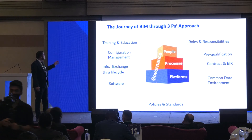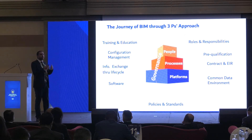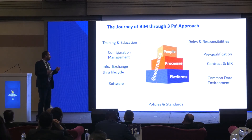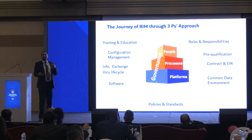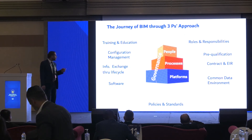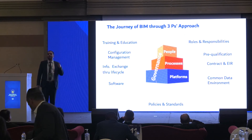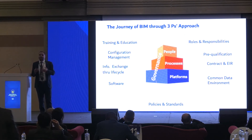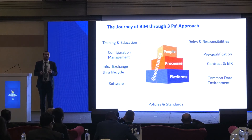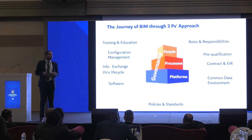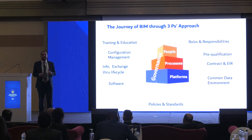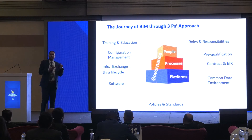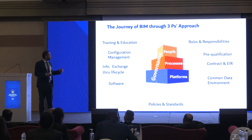For the processes, there is configuration management, the information exchange between different life cycle stages to be managed, pre-qualification for the contractors, consultants and everybody included in the process, and of course the contract rearrangement or contract modification. Because most companies have a template for their contracts, you need to update or modify it to include BIM requirements in order to avoid any variation orders in the later stages.